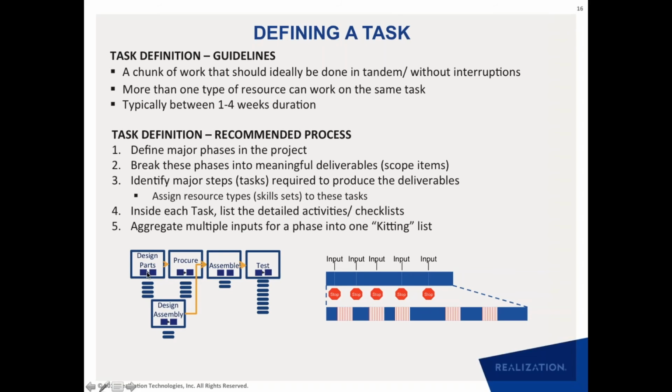So that helps you define what is a task, what is a subtask very easily, starting top down from phase, going down from phase to scope, to deliverables, to tasks, and then to subtasks. And similarly, on the input side, instead of managing all these inputs that can come at various times in the project, you try to club all these inputs into one full kitting point.